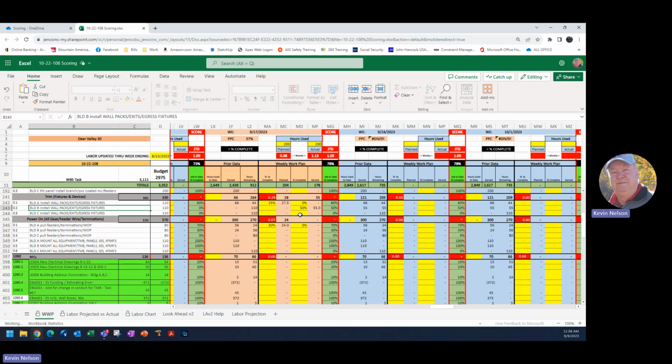What you don't want to do, and I think this is what I'm not trying to do, is say, well, let me go ahead and up that percentage because I don't want the office getting upset at me for scoring over a 1. So we'll just continue to increase these numbers until I get it to a 1. So in my example, I increased this to 70%. Don't do that. It's not an honest evaluation. If you're 50% done, then that's what you're done. If in fact you got it to 70%, that's great news.